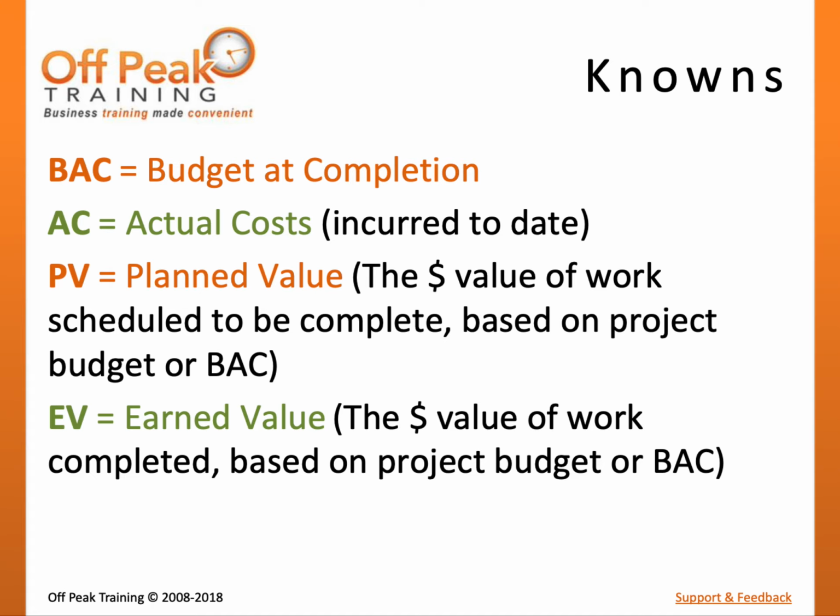Planned value represents the value of work that should be completed based on the current date and time. By knowing the percentage of work that should be or is planned to be completed and the budget at completion, the project team can calculate the planned value. For instance, if the project was scheduled to take 5 days and cost $1,000, the planned value after 1 day, or 20% of the schedule, would be $200. Simply put, planned value is the dollar value of the work that should be done.